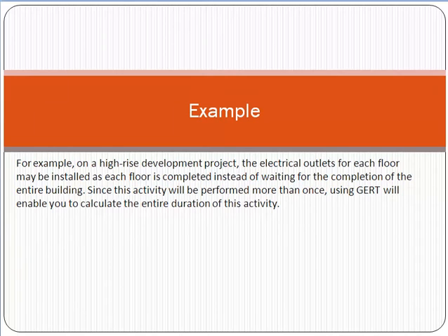See friend, here GERT, first of all, it is an estimation technique. Secondly, it deals with activities which are done in a loop. So it is a very good approach when we know that the activities are repeating, so we can use the concept of GERT for the estimation of tasks. For example, the electrical outlets need to be installed on each floor, so you know that the installation is repeating again and again, so we can use the graphical evaluation technique here.